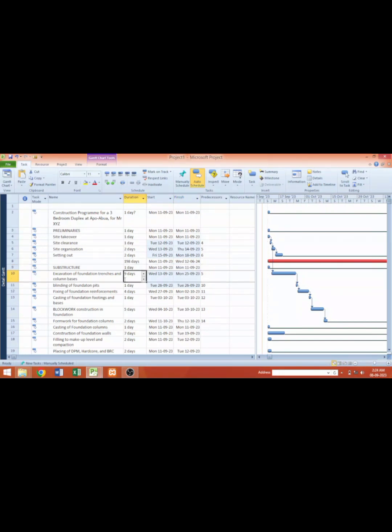Well, at this point, we have talked about work breakdown structure, listing of all activities involved, and arranging the activities in order. Now the next thing is to create timeline in our project. Timeline is grouping groups of activities under headings for subcontracting purposes. Similar activities should be grouped under a heading, under a timeline, so that you can easily assign that group of activity to a particular worker or to a particular contractor and so on.